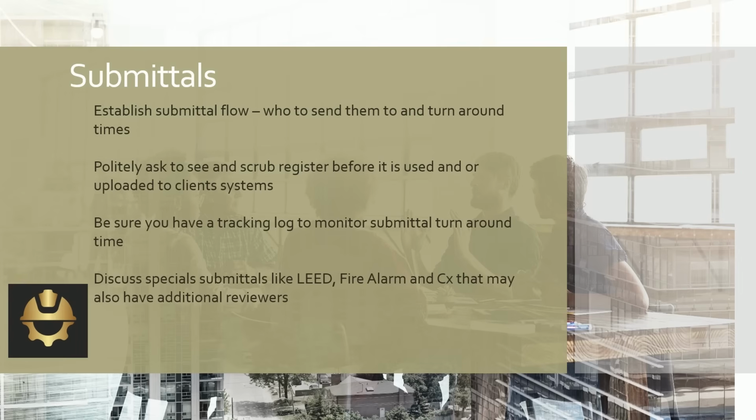They were able to get that approved with this design. So as soon as that design was stamped by the end user, which in that case was the Corps, we released them to order, and they procured right away. Yeah, that's the big takeaway here: it speeds your schedule up. It allows your subcontractors to bill right away for that equipment, and it's less paper that you have to do during the actual project.